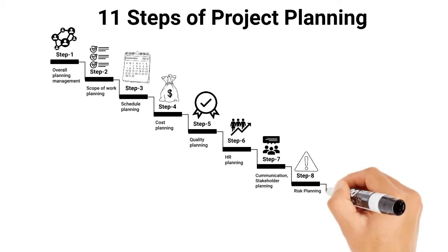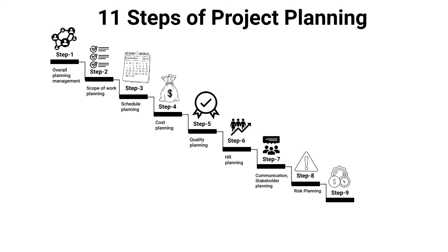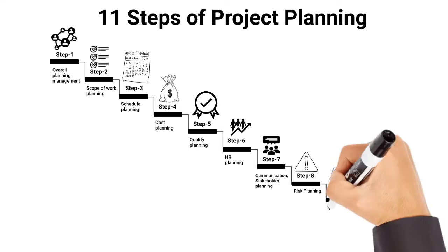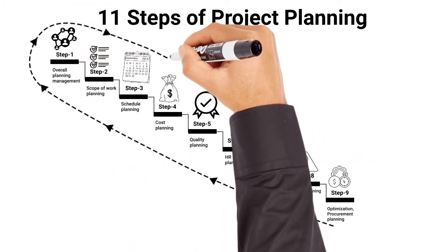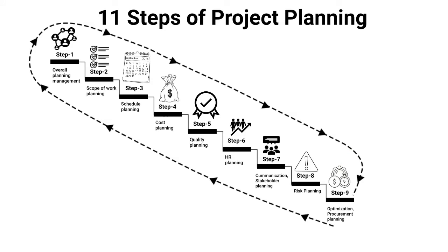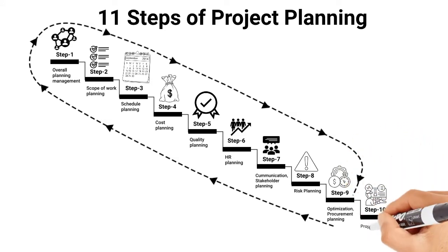Then repeat the above 8 steps based on the feedback of the team's members and function owner. The purposes of these iterations are to optimize the plan and synchronize the expectation with stakeholders. Once the iterations are done and the plan is optimized, the next step for the team is to assess what to purchase and create procurement documents.